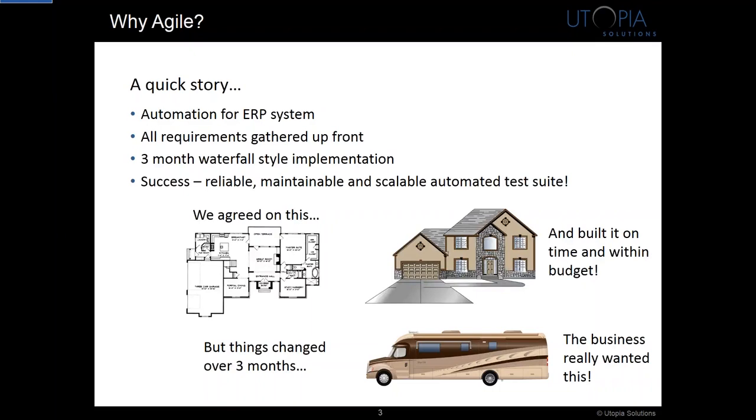And what we found was that there were some common issues, and the two most glaring were that we weren't doing a good job of identifying and managing scope change during the implementation. And we had a lack of customer involvement during the implementation. So even though we're a third party coming in and implementing automation, certainly anyone implementing automation has an internal customer. And we found that we had a lack of involvement during our implementations.